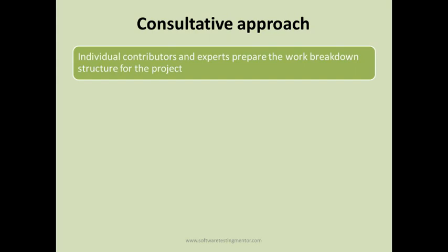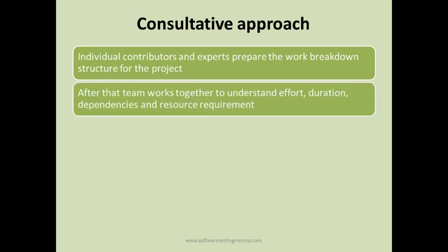In the consultative approach, individual contributors and experts prepare the work breakdown structure for the project. For example, technology experts, business experts and testers prepare a work breakdown structure for the project.